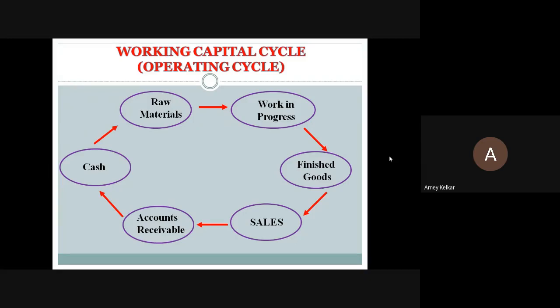What happens in civil projects is that managing the working capital cycle becomes very important, because if the working capital cycle gets delayed, the account receivables are delayed, and once account receivables are delayed, you will not get the cash in hand and your next cycle won't start. So many times it happens with people in contracting that their money keeps on flowing in cycles only. They get the money, the profit is yet to come. What money they get, they invest in the next project. Again, they are getting the money. Till then, somewhere one part of the profit of the first project comes in, that becomes their asset.